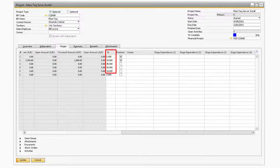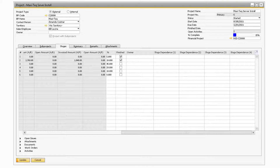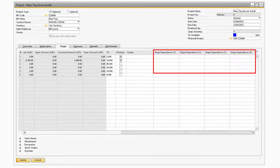Moving on to the Percentage field, this is where you can enter how much of the total project the task covers. After finishing a task, the percentage will be applied to the Percent Complete field towards the top. Once you do finish a stage, you will need to check the Finish checkbox in order to indicate that the stage is fully complete. Next, in the Owner field, you will be able to select a specific employee to assign to the task. Finally, in the Stage Dependence fields, if you enter a stage into any of the fields, the current task cannot be completed until the prior stage has been completed.